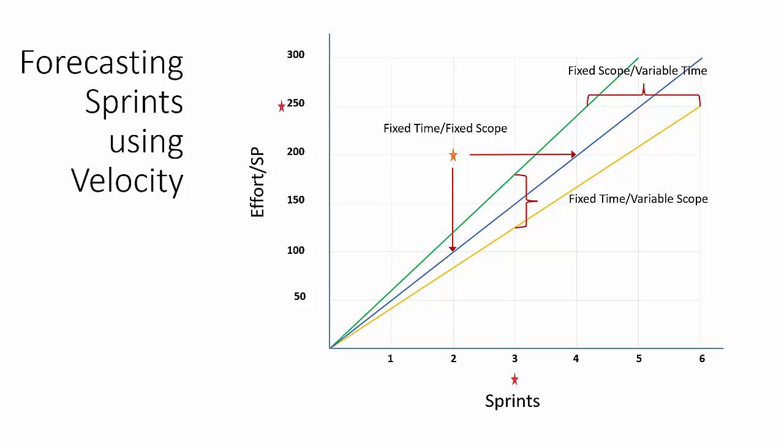Either I can do 100 story points worth of work in the 2 sprints, or we will need 4 sprints to be able to do the full 200 story points. So this gives you a way to evaluate what is happening, and of course it also helps you then to track the actuals as they come in. So this is how you use velocity.